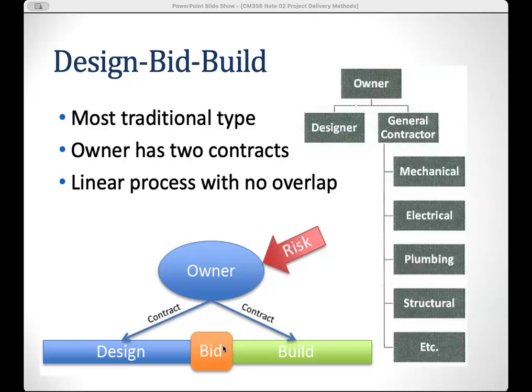Then you review their technical methods, or the construction methods, and also review the company approval. And then you review the estimating, which is the pricing that they give, right? And then you will usually pick the lowest bidder, right? And then issue the contract. So then you decide who is going to build your project. So this is the design, bid, and build process.